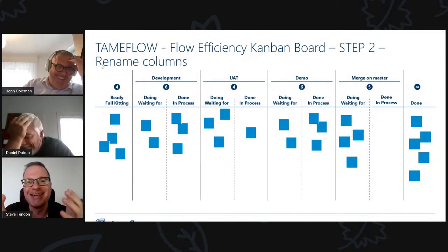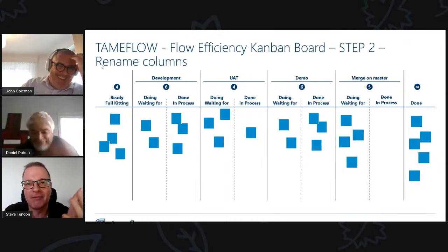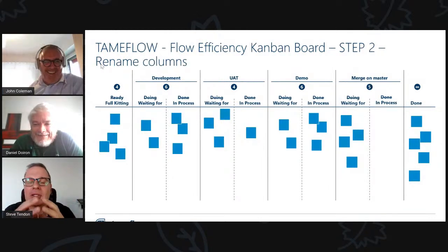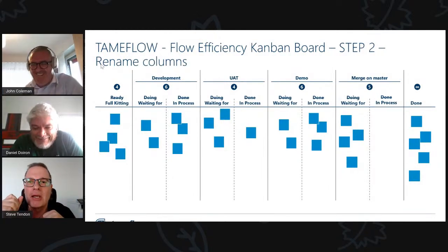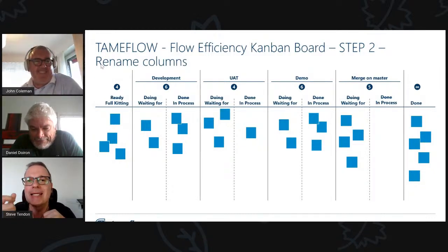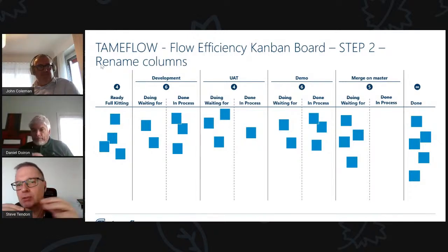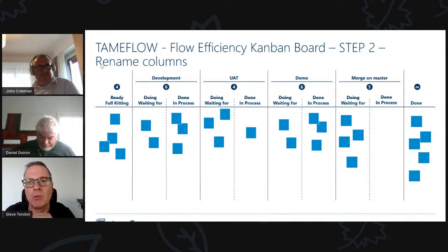So no, really, it's very visual. A baby asking for food and the exploding bird, right? So in this situation, what is the equivalent of the baby's cry, the signaling that, hey, I'm hungry, I need something to eat or to do in this case? Yeah. In a Kanban board, it's the work going under the WIP limit, where you have an empty slot, and that signal trickles up eventually to the very beginning of the board, and you have the release of new work.